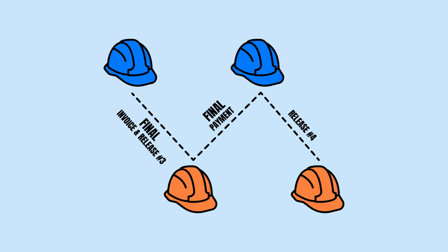Right. But they're like a number 3, so you get to the end, and I submit my final bill to you, and I'm going to give you a number 3 that's a conditional upon final. So it's telling me it's the final. Yep. Final with retention and everything. After this, nothing after. You're not sandbagging. I'm not getting another one after this. No. This is going to make us clear, whole and done. We're contract, saying goodbye.